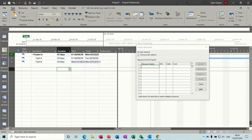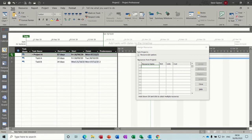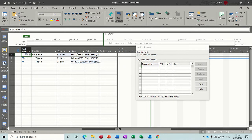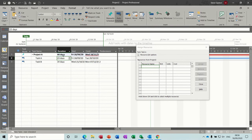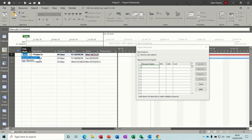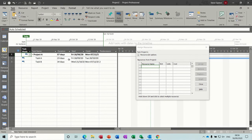So what you can do is you can highlight the whole summary tasks. So as long as this is on the auto schedule feature, because if this is on manual, or if you type on that, this is why I don't like this feature, if you type on that, this is no longer clocking up what is underneath, it's just something you've manually typed in. If you make sure that is on the auto schedule option, and then that is collating the durations underneath. And if this changes, you'll see the change as well.